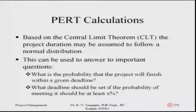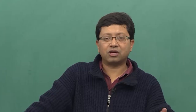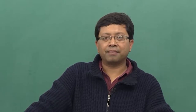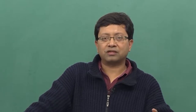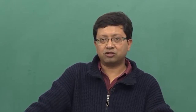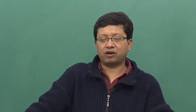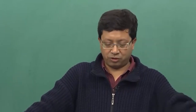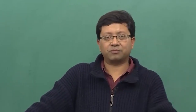Based on the central limit theorem, the project duration may be assumed to follow a normal distribution. Although we have been using the beta distribution for individual activity durations, repeated simulation of activity sets shows that the overall project duration converges to a normal distribution. This is a very important concept in statistics.